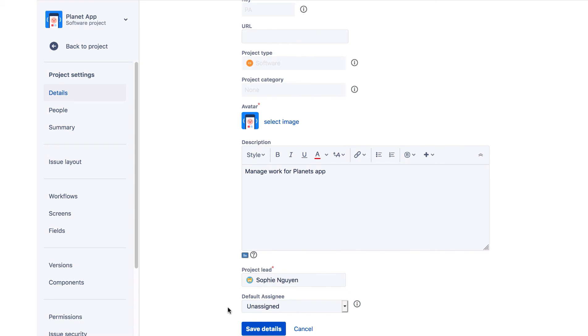It's important to set the default assignee correctly for your project, as this controls who's tasked with new issues when they're created. If the assignee is not specified when an issue is created, the project's default assignee is used.